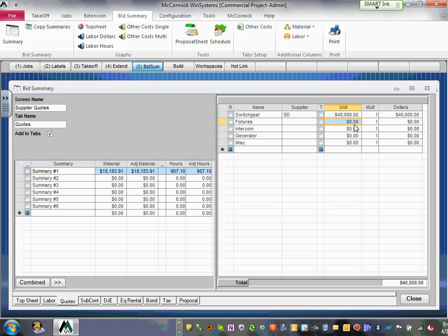You take all the panels that you're going to be taking off, and send them to Square D, Cutler-Hammer, Siemens and GE. All the panels, the transformer, the ATS switches, all of it. If you don't have any of the switch gear, type it right here. You can type it and put 40,000. So we send them to 4 vendors and they give us this.